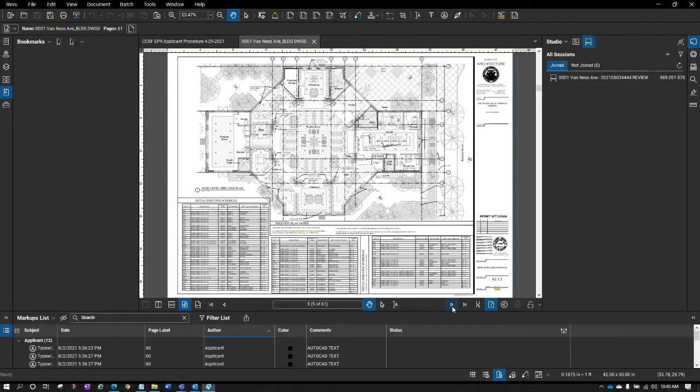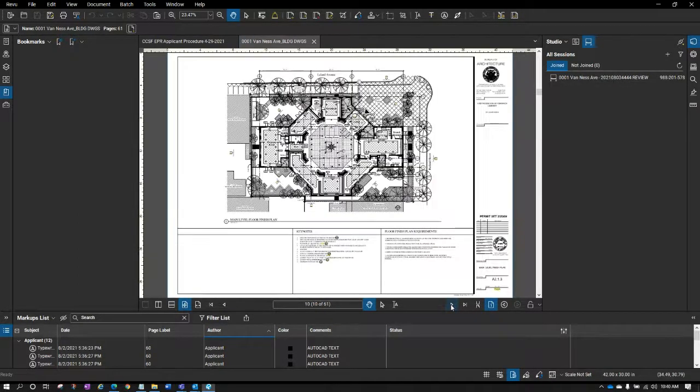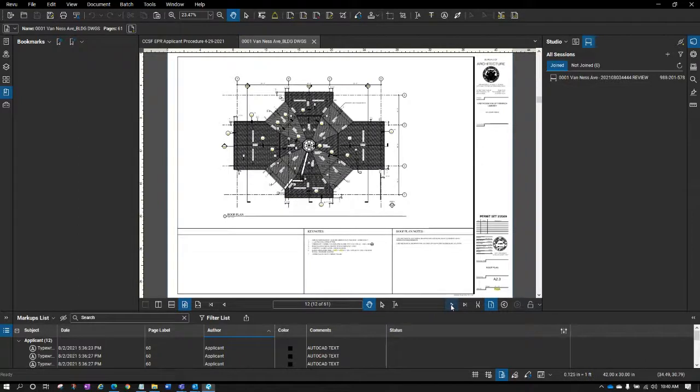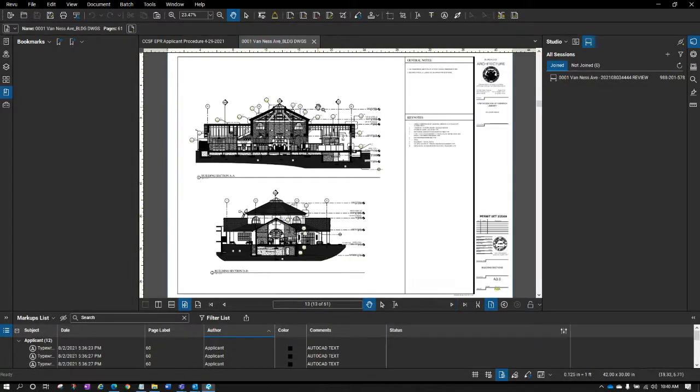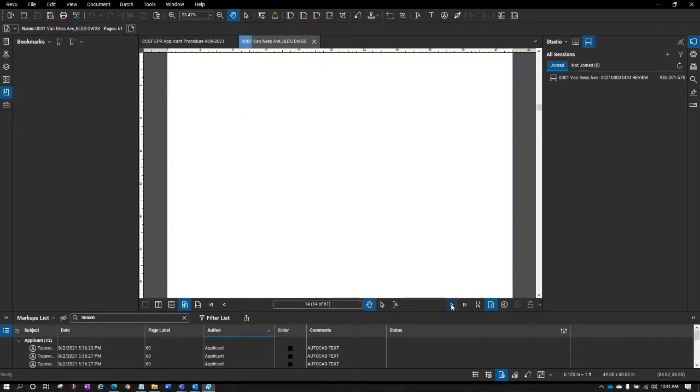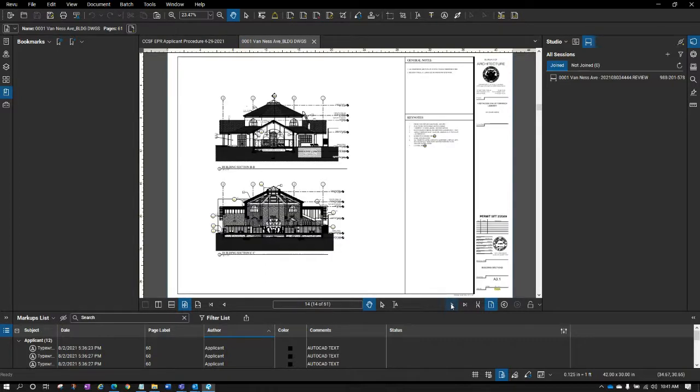If that's the case, we want to make sure that as I cycle through, you see I'm clicking these pages and going through them, I don't have any pages that take a minute or 2 minutes to generate, because when you scanned it, you thought, oh, I'll just scan it at the highest resolution I can so it'll look good. But really, that will cause issues. Any submission that's drawn here should really only be submitted at about 90 to 100 DPI.